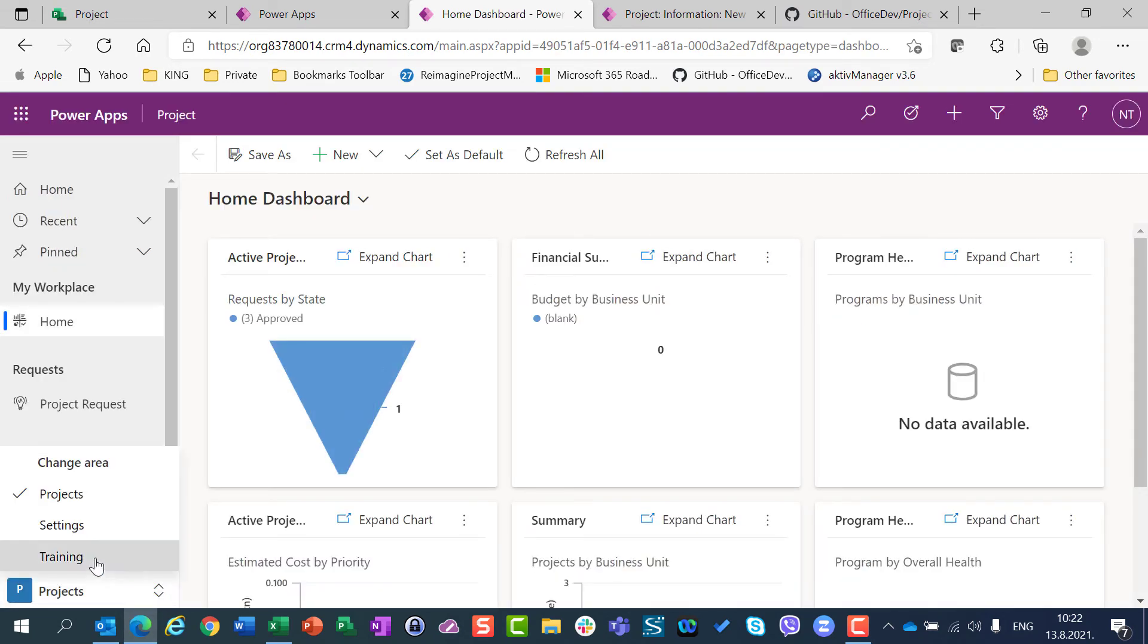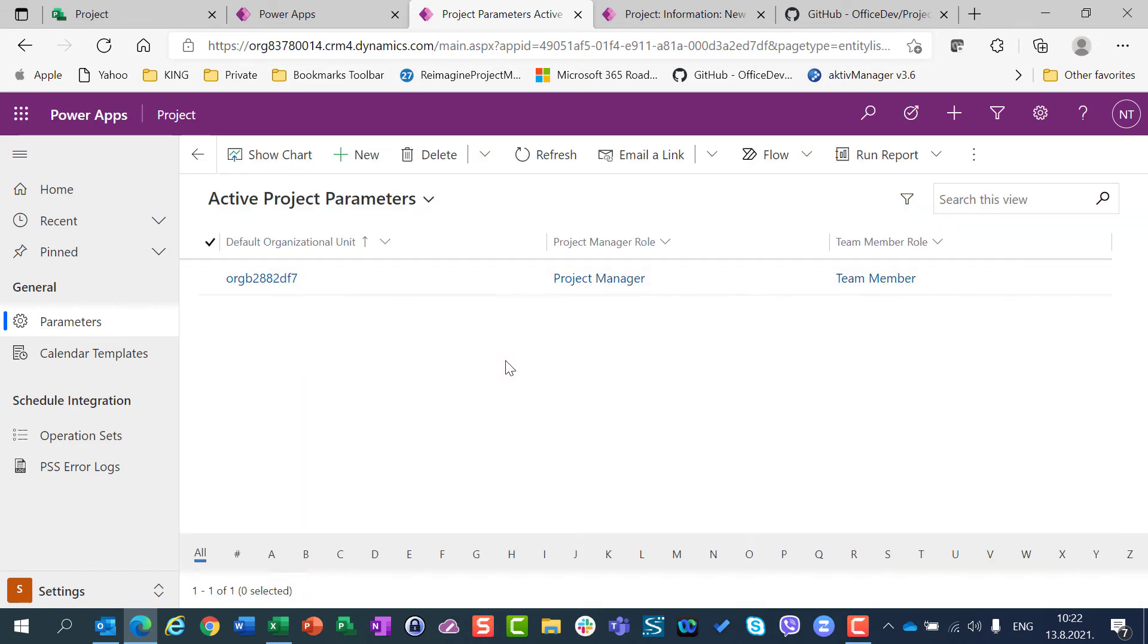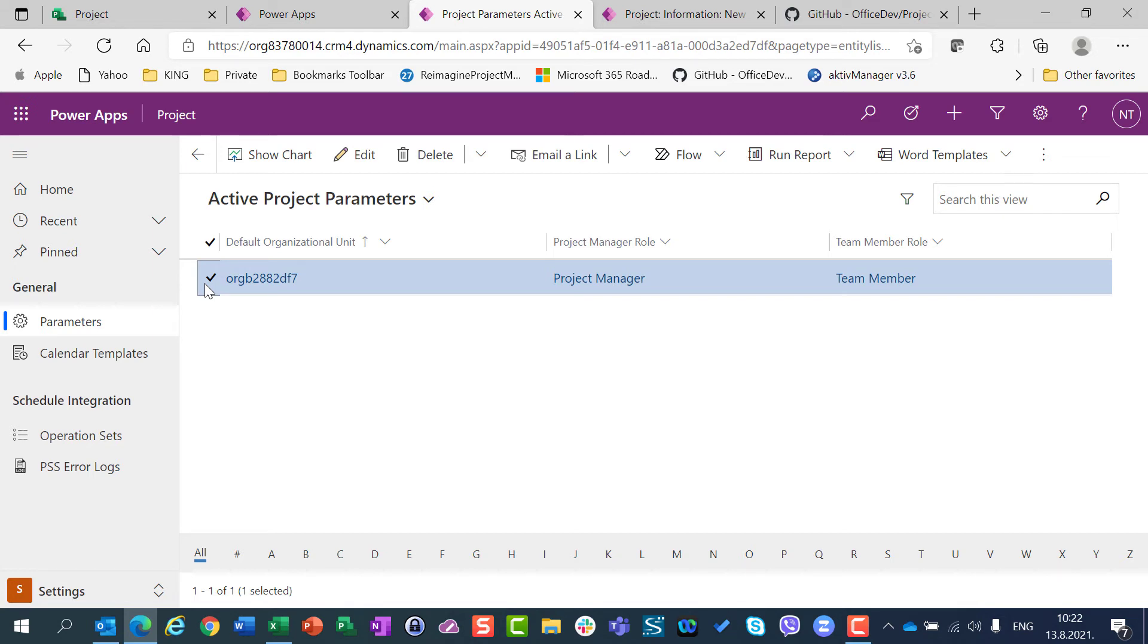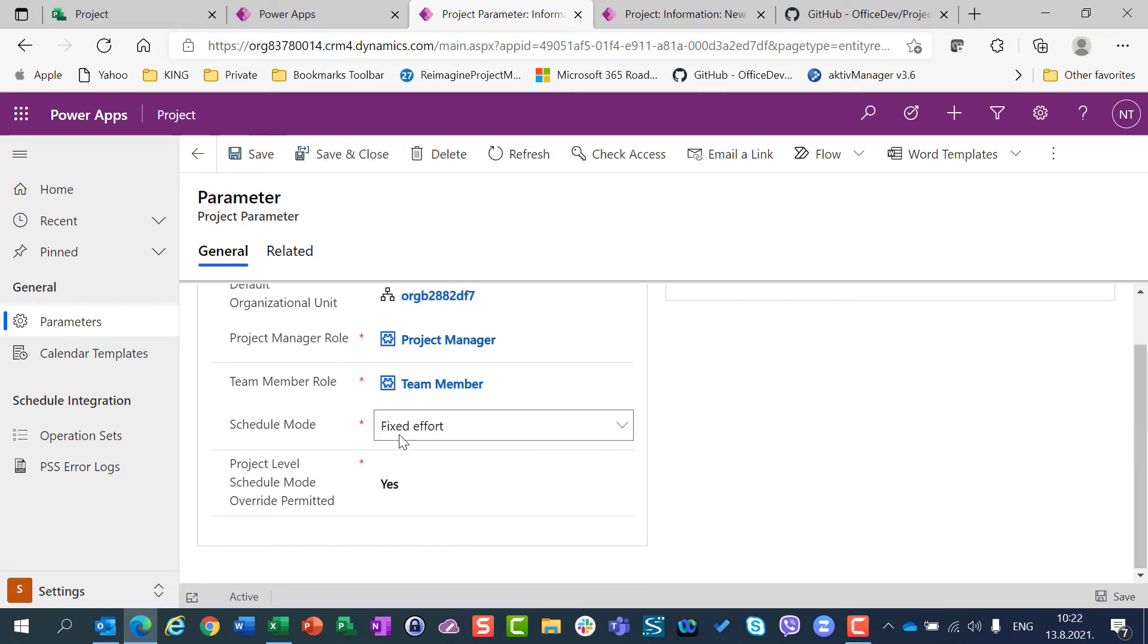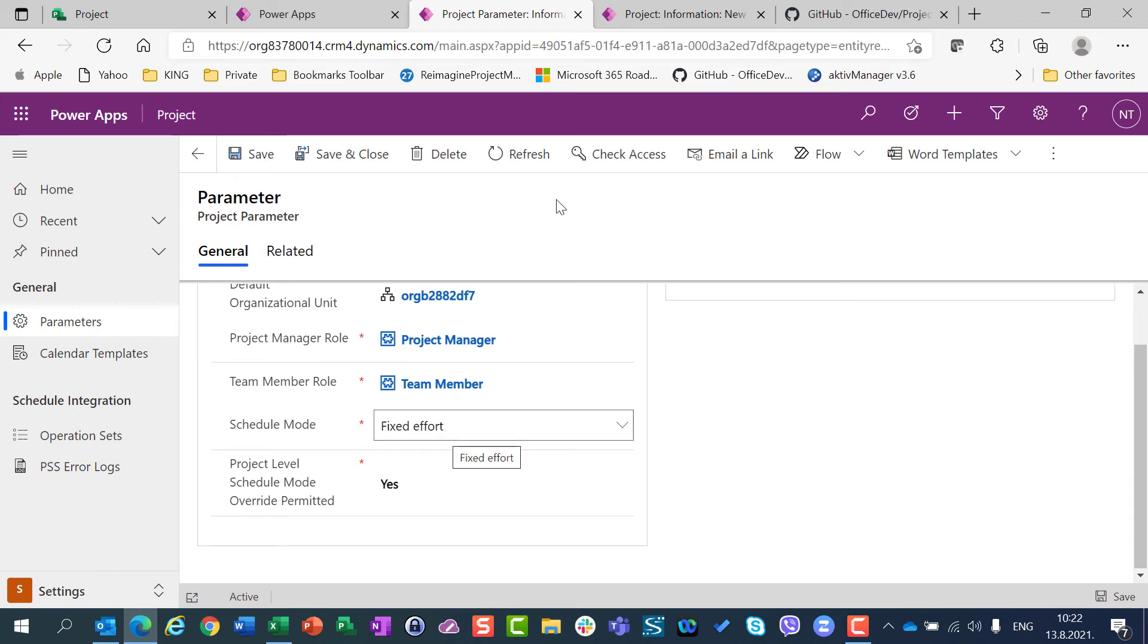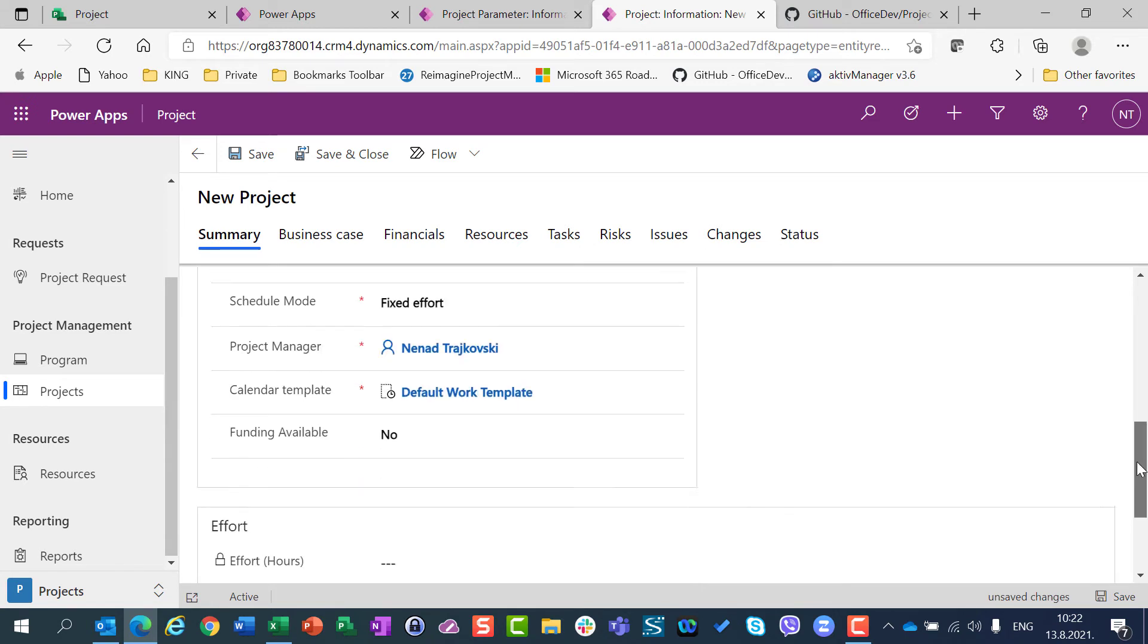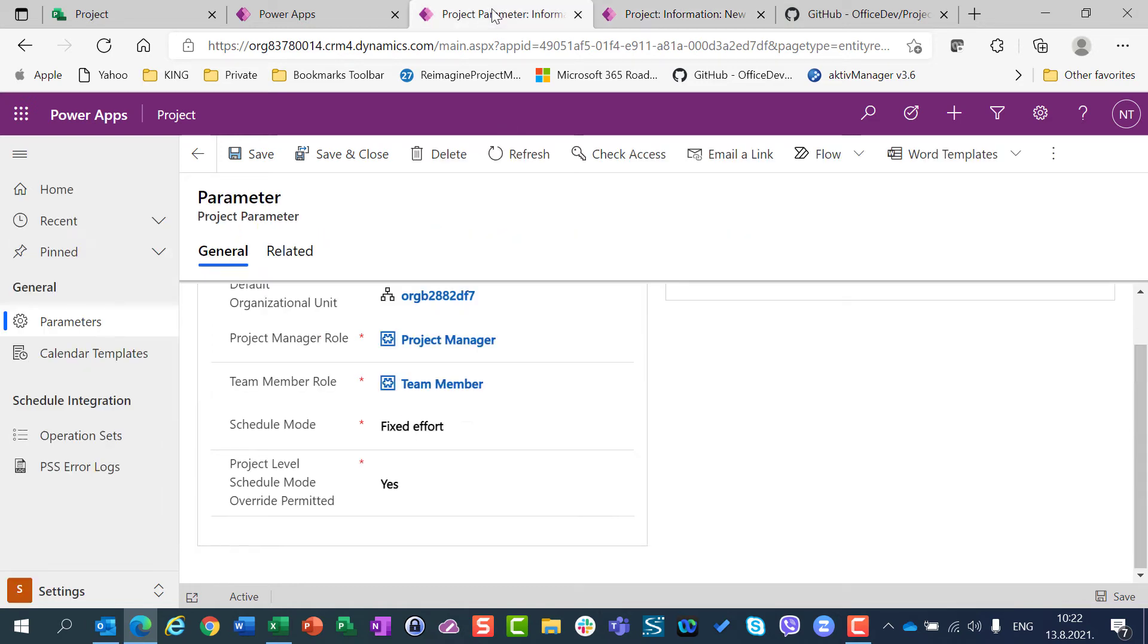and if I go here to Parameters, let me wait a minute, and if I choose my default organization unit, and if I go to Edit, I can here choose Schedule mode, and according to this Schedule mode, these settings, when I open or create a new project, it will offer me Schedule mode which is defined by default here.